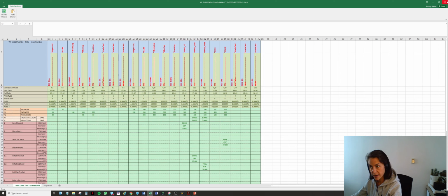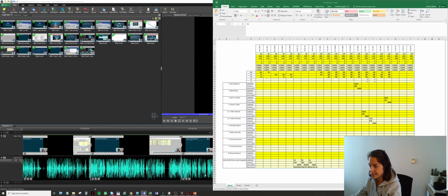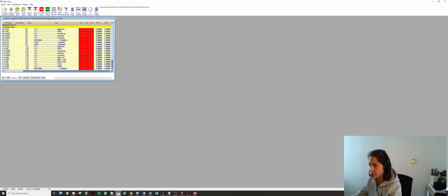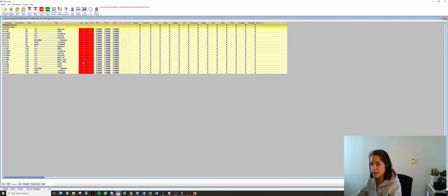I can close this file for now. I want to save it, and I remember that this is in my BCK directory. So now back in ECOS, I can import Turbo, right? I've exported it to generate my template, and now my template has been filled in, so I want to import it back.